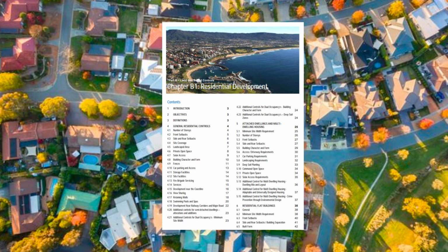The draftsperson also needs to be fully aware of the requirements of the local council, which they are, particularly sections 4.3 and 4.16 of the local DCP regarding setbacks and views, as the deck will overlook the neighbouring property to the north. This can help guide the client towards a design that is buildable but actually compliant.